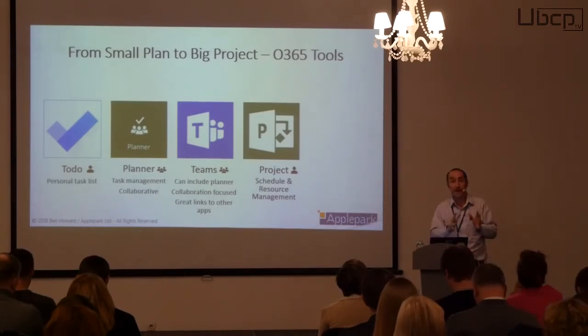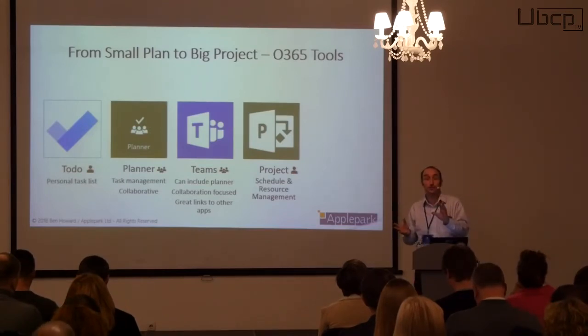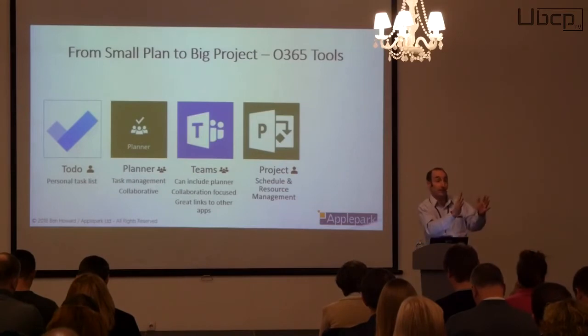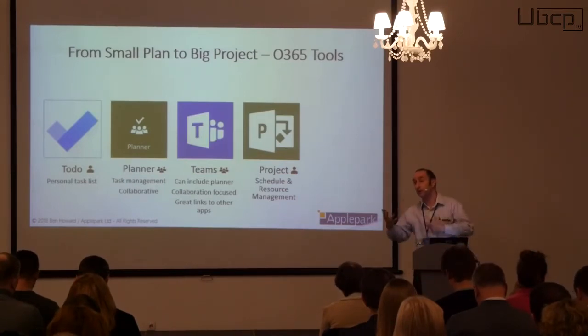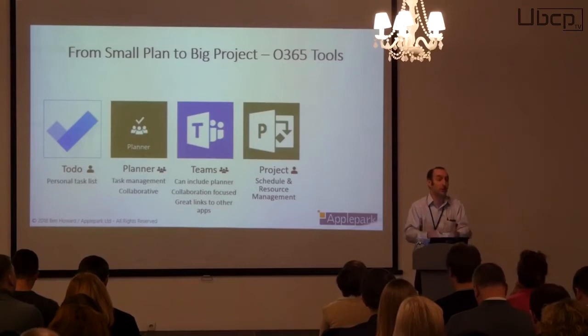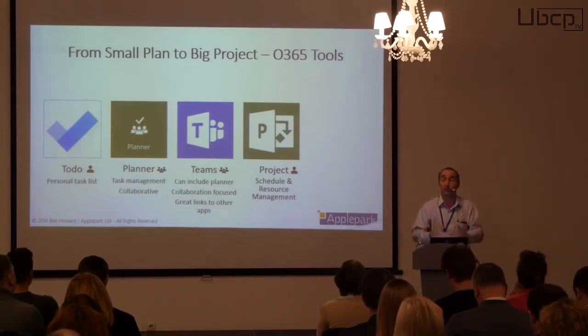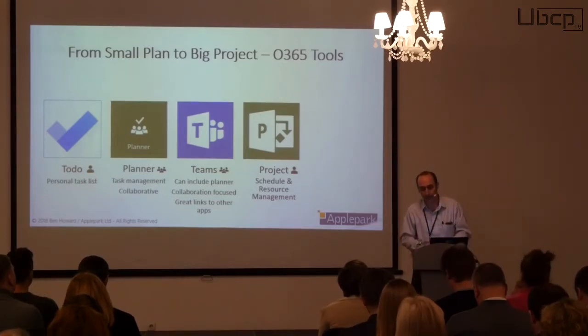So Project allows me to begin to say, these two tasks are related to each other. If this task moves out, then this other task should move out. So I'm really about creating and managing a schedule. And if I'm able to do that, and I assign resources to that schedule, then I can get resource management, good resource management as well.